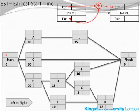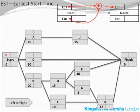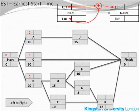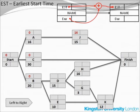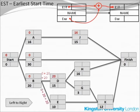For every other activity, the recipe is: take the EST of any activity, add the duration of this activity, and you'll get the earliest start time of the next activity. From the start node: zero plus zero gives EST of zero for activities A, B, and C. Activity A: EST of zero plus duration of 16 makes the earliest start time for activity J equal to 16. Activity B: earliest start time zero plus duration of 20 gives earliest start time for activity D equal to 20. A similar calculation may be done for activity E.